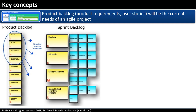In the agile lifecycle, product scope is documented in the form of a product backlog — a list of high-level requirements or characteristics of a product. The top-ranked items from the product backlog are selected for a sprint and added to the sprint backlog during the sprint planning session. These requirements are further elaborated in the form of user stories. We will talk about product backlog and sprint backlog in more detail in another session.